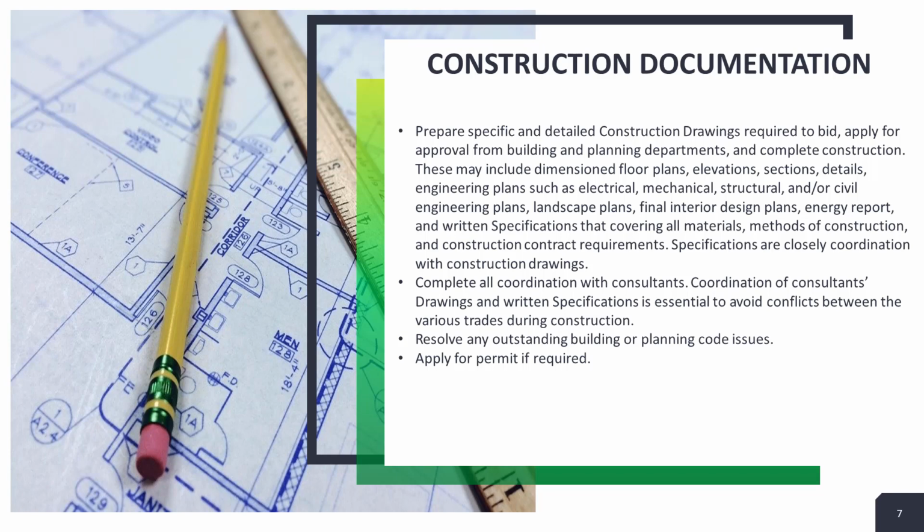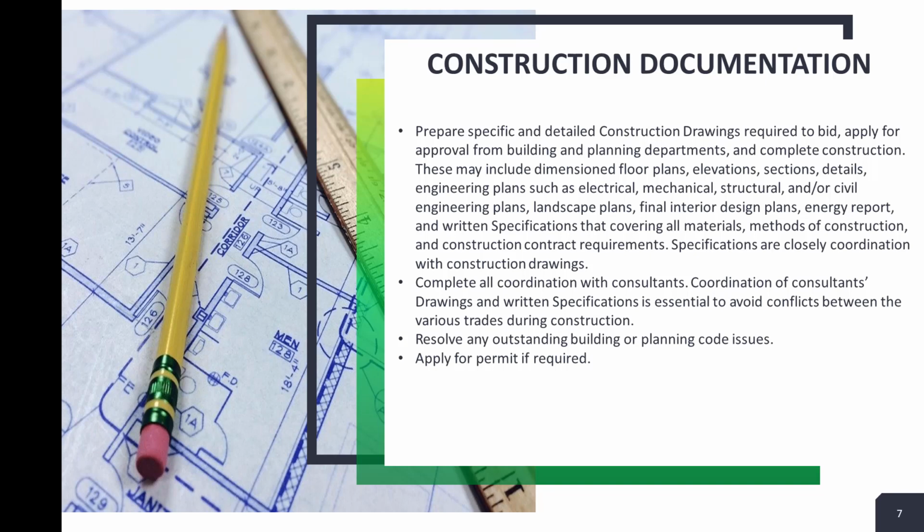One thing we try to do is we try to make any changes to the documents prior to it bidding. Any time after the bidding has taken place and a change is made, it is going to cost more. That is just the nature of the business. So we try to resolve any issues prior to that. Again, in most cases, we are not going to have any change orders in the construction administration phase, but we try to get those taken care of prior to that.